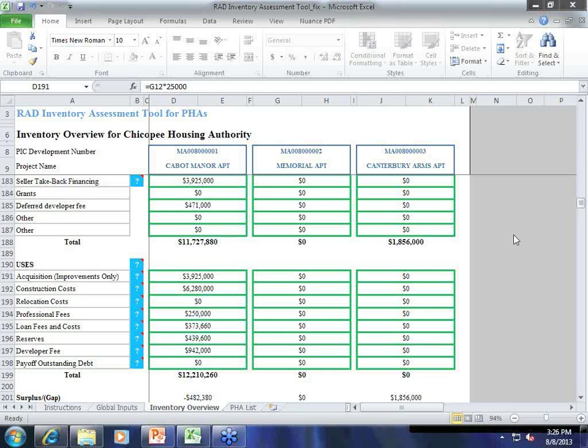Well, it's a good question, and it's obviously going to vary. But I would think of it as the number that you think is going to be the amount on your construction contract. So it would include the builder's overhead and profit, or if you're doing it yourself, whatever your overhead and profit would be. And typically in a rehab, people like to see either in the construction contract or outside of it, a 3 to 7% contingency.